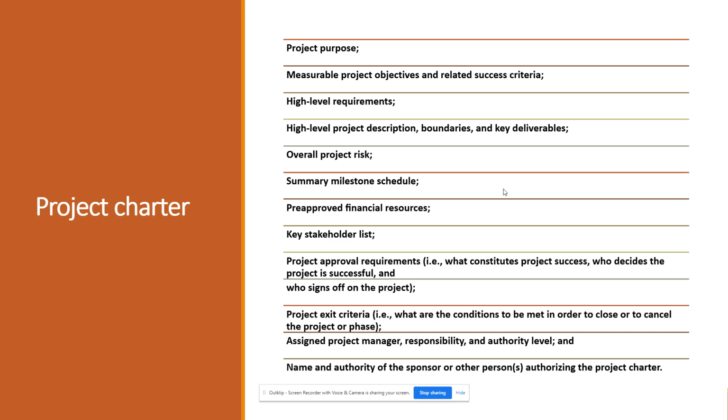If they say high level or broader, the answer is the initiating phase, not the planning phase. There will always be confusion between the planning and initiating phase, but you should be careful regarding the high level assumptions and high level constraints. Those are things we can update throughout the project, but the high level, the broader level, will be done in the initiating phase.